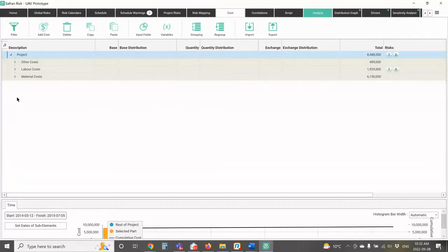So what we tried to do, this cost manager and myself, is we would sit down and say, okay, let's see how we can put our two models together. So what we did for a little while was we would build a cost loaded schedule. So we would take all the cost estimates and all the estimates to complete, and we build them into a resource loaded schedule. And that worked, but man, it was hard. I mean, getting those things aligned all the time and figuring out which costs should be on a milestone and which costs should be on an activity and how they were impacting and all that sort of thing. It was a lot of work to build. So people tried that and generally got away from it.